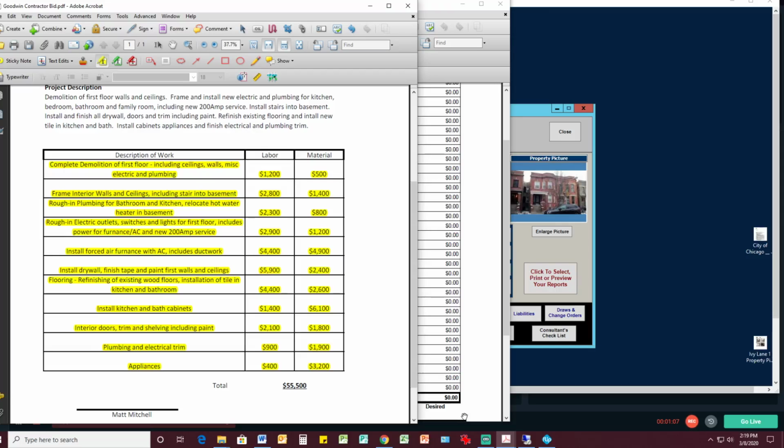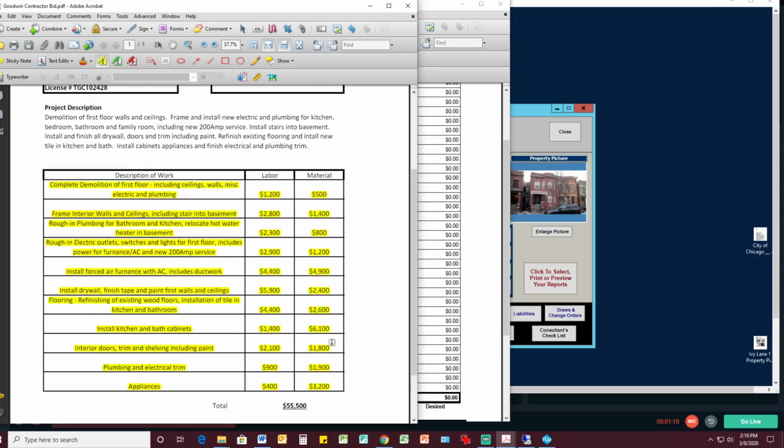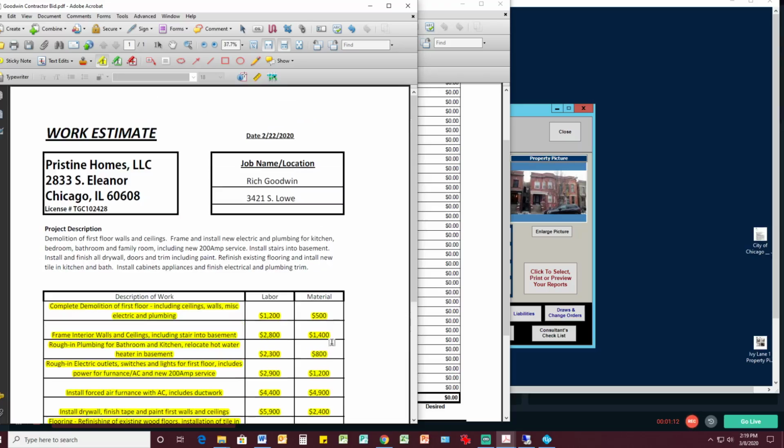So, just to give you an idea here, in order for me to get this report going, because remember, the lender's looking for a report to be completed, my obligation is to put the responsibility for doing things the way he was instructed to do right back onto the contractor, which I intend to do. Now, as we cannot match the contractor's bids, what I try to achieve is to match the bottom line total, remembering that our system is an estimating system created to represent the street value of the work, and at no time will I be matching up the individual work items.